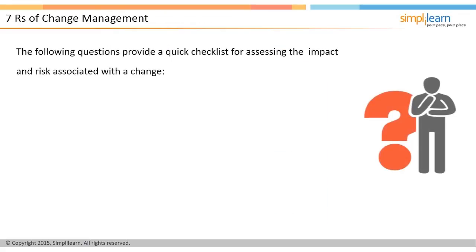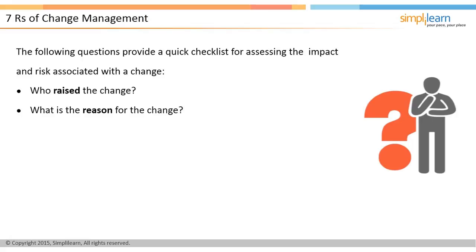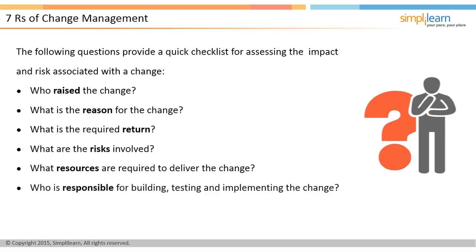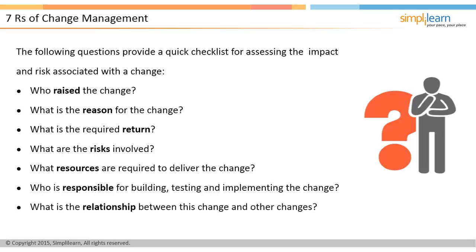The Seven R's of change management are a set of seven questions forming a quick checklist to assess the impact and risk-to-benefit ratio of a change: Who raised the change? What is the reason for the change? What is the required return? What are the risks involved? What resources are required to deliver the change? Who is responsible for building, testing, and implementing the change? And what is the relationship between this change and other changes?